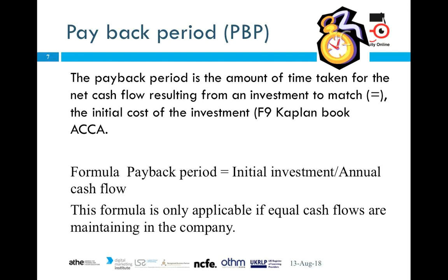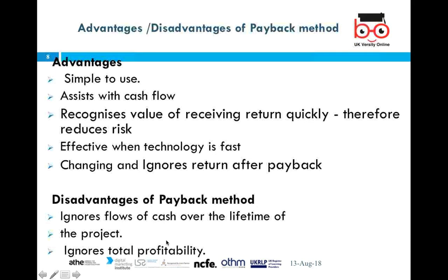First is the payback period, which means the amount of time taken for the net cash flow resulting from an investment to equal the initial cost of the investment. The typical formula is initial investment divided by annual cash flow. There is no discounting factor, and this formula is only applicable if equal cash flows are maintained in the company.